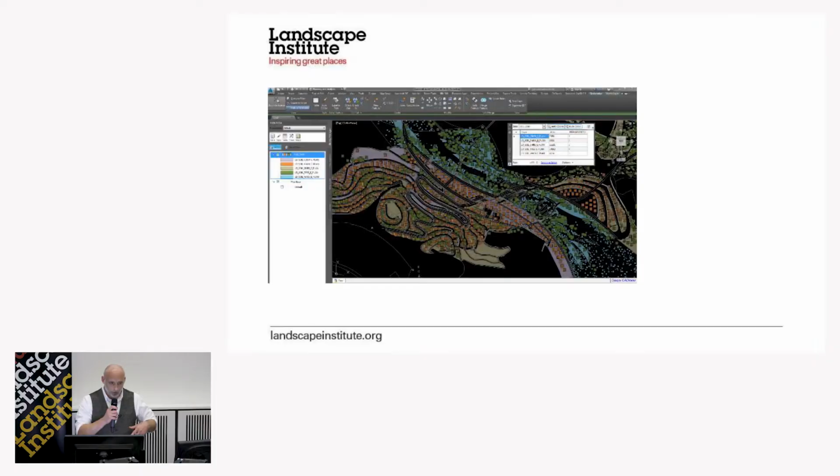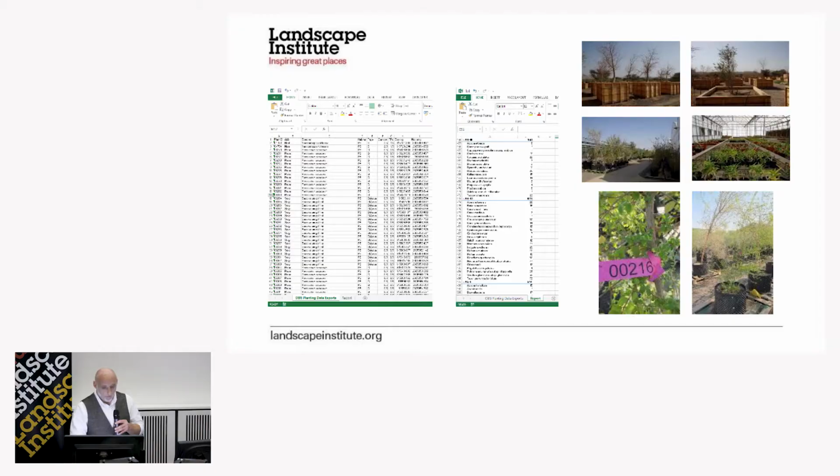Secondly, we also had a requirement to produce the soil drawings, and from that single set of data, because we knew each plant had an attribute that would say how big the tree pit was. We also had data in the background that would describe the depth of the soil, so the build-up of what each plant needed. So we would run it through that workbench, and out would pop not just a soils model, it would actually calculate the quantity of different types of soil that were going to be needed throughout the entire project. And again, that was all just derived from the single set of data.